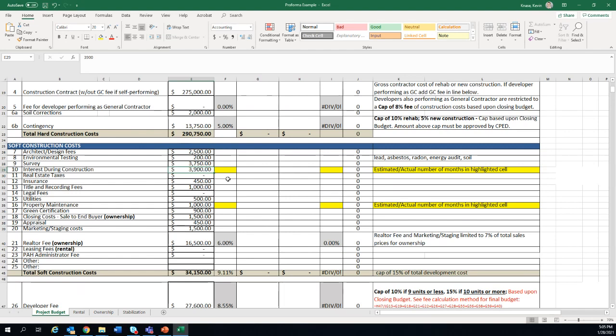So how the city's financing works is we're providing gap financing. We're not necessarily financing your entire project. And so let's say, in this case, you're building at a $375,000 total development cost. And then the sales price at fair market value is $300,000. The city can help fill that gap between that 375 and that 300,000, and that's what we call project gap. And that's a portion of the financing you may be requesting from the city. And then we also have affordability gap as well. And I'll talk through what those amounts are here in just a second.